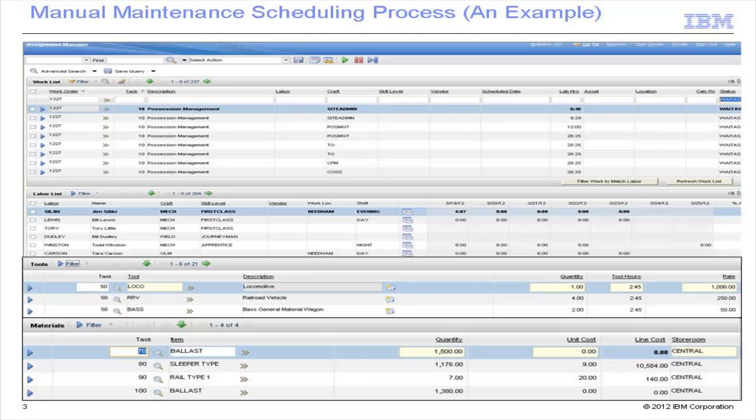Today, maintenance scheduling is predominantly done through a manual process where the scheduler uses their own knowledge and experience of the tasks and resources to schedule the activities. This usually leads to a sub-efficient schedule with some risk of resource overload, and the process tends to be time consuming.